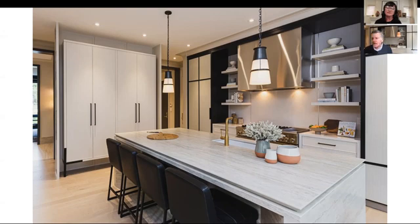So when COVID hit and the site was shut down because only certain people could be in the house at the same time, that's why the house was constructed 24 hours a day, 7 days a week, because we couldn't have the same crews that we had normally when we build this. We could only have one group at a time. So it was the painter or the floor people. So we were very panicked. How are we going to get this house done?